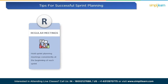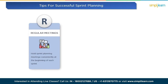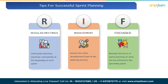Best practices for successful sprint planning: Tip one — hold sprint planning meetings consistently at the beginning of each sprint for a predictable schedule. Tip two — involve the entire development team in the planning process to encourage collaboration, diverse perspectives, and more accurate estimation. Tip three — keep it focused on what can be achieved in the upcoming sprint, avoiding discussions about future sprints. Sprint planning is the backbone of a successful agile development process, enabling teams to deliver value consistently and efficiently.